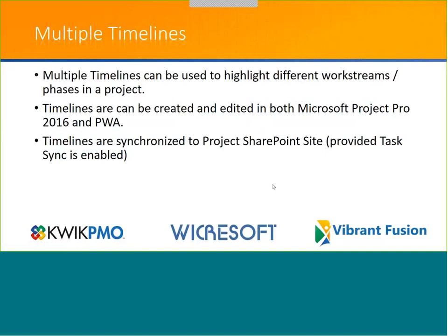And as you update your schedule, the timeline automatically updates, so forth and so on. With the multiple timeline capability, the reason they came out with this is because when you have a single timeline, if you have a large project with lots of activities going on, that timeline can get pretty unwieldy. With the multiple timelines, it allows you to actually break out different phases or different work streams in a project and let it have its own timeline so that you can then put in as much detail as you want, but it doesn't get all cluttered. It looks a lot better.